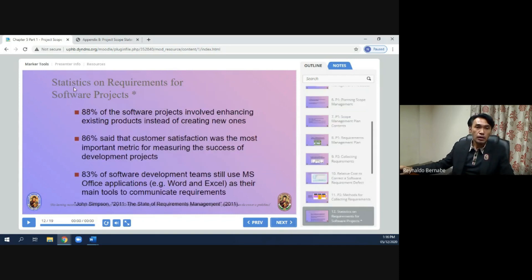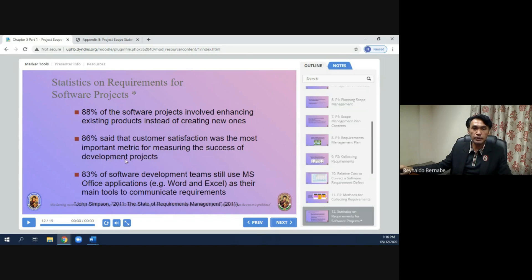Some statistics on requirements for software projects: 88% of software projects involve enhancing existing products instead of creating new ones; 86% said that customer satisfaction was the most important metric for measuring the success of development projects; and 83% of software development teams still use MS Office applications like Microsoft Word and Excel as their main tools to communicate requirements.